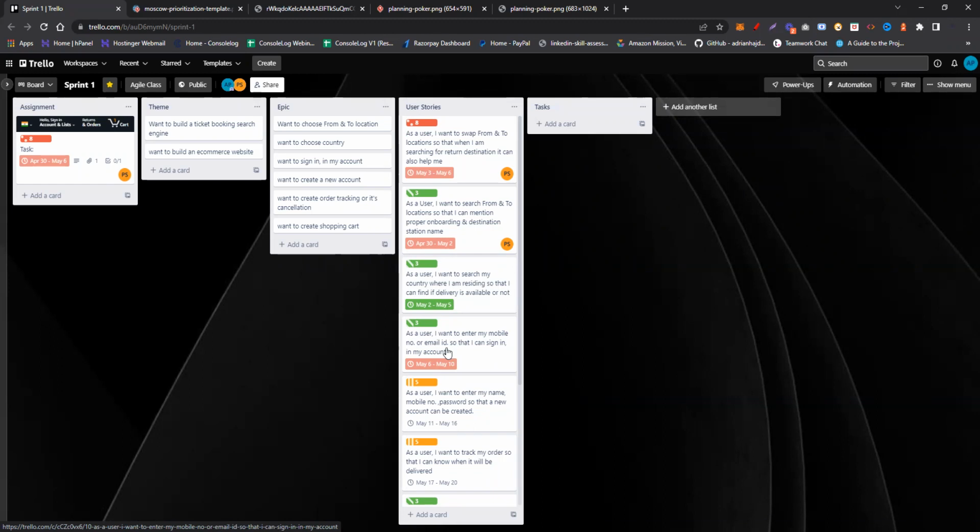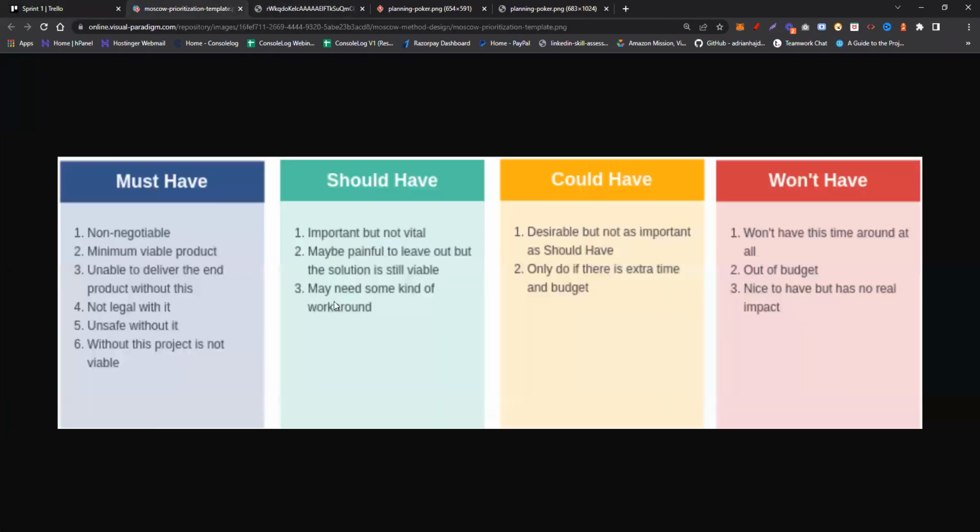Correct? So it's very easy for you or the product owner to understand which user stories are very easy, which are easy but maybe some effort is required, or maybe complex and huge effort is required. So you can easily understand. Based on that, once you play, you can easily judge how many user stories they are capable of building within 21 days. Now, obviously, suppose you wrote 70 user stories as a Scrum Master. You played for 70 user stories, but everything is not possible to build within 21 days. Then what will happen? You have to sit with them regarding this.